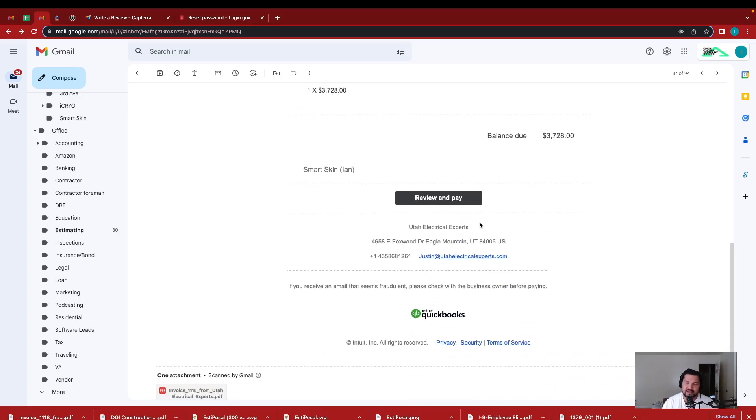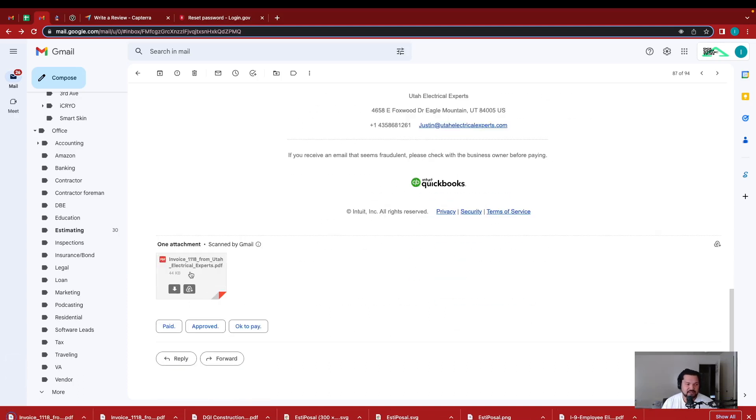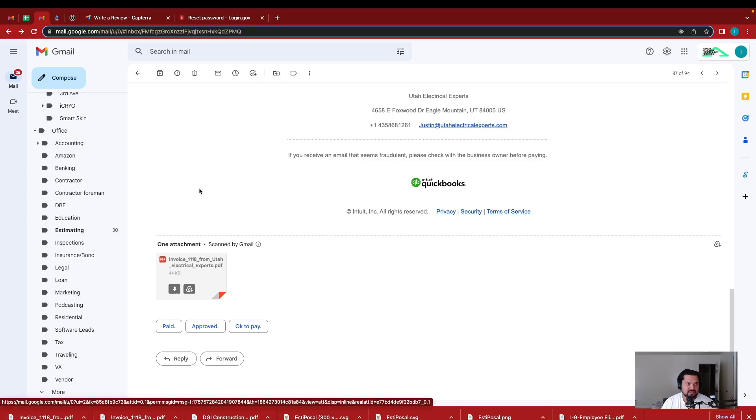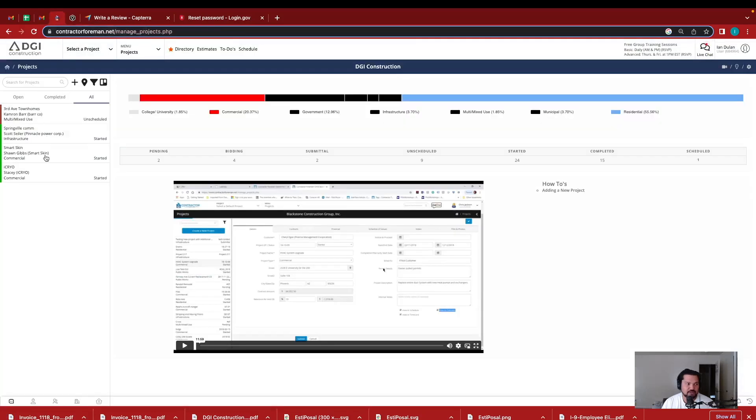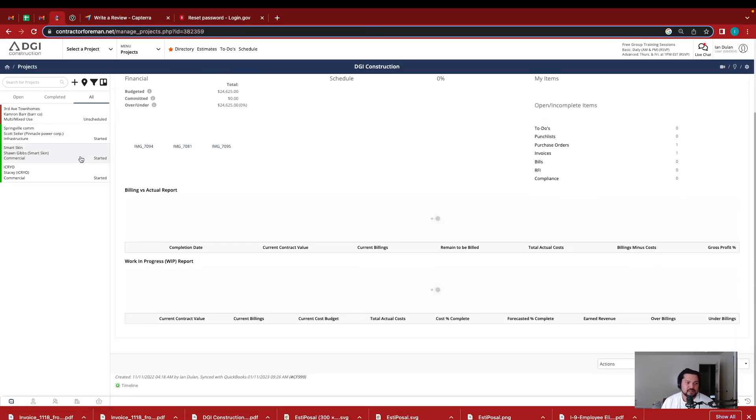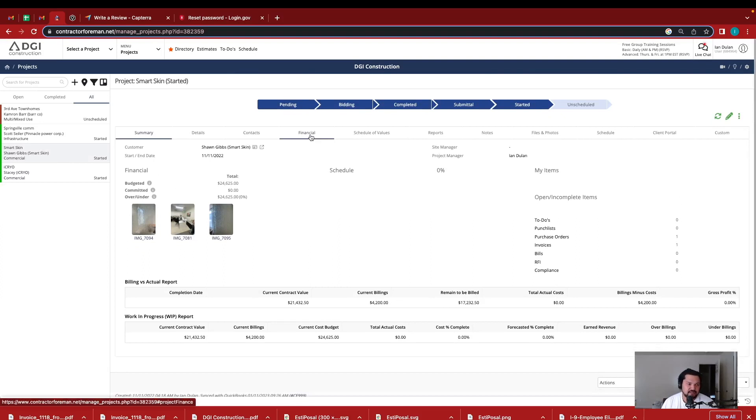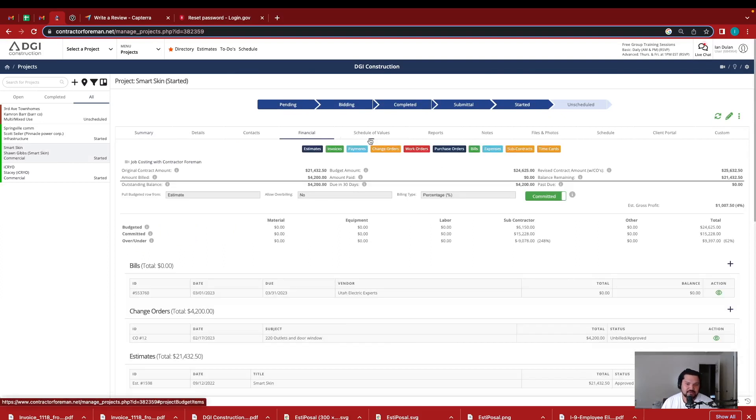I had marked it up in Contractor Foreman before I sent it out to the client. So what I do is I will download his invoice here. I will go into Contractor Foreman, go into the projects menu tab, and then click into the project. Once I go into there, I go into financials and then I add my bill here.